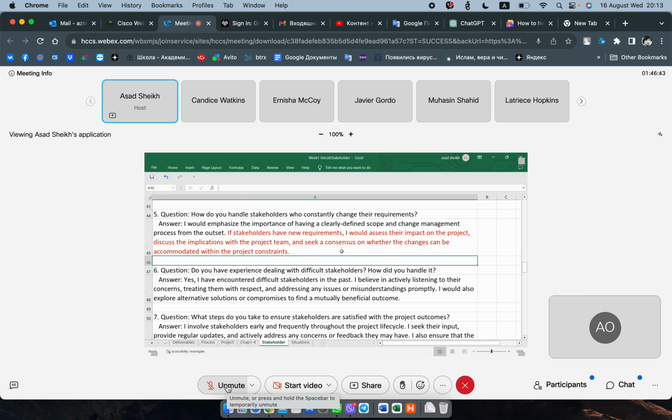Okay, you want me to make a change? Let me look at my triple constraint, which has three things on it. What are the three things? Cost, time, which is schedule, and then budget, the dollar sign. So that's the impact. Is there any impact to cost? No. Is there an impact to timeline? Yes, because they want me to add new stuff that's going to take another 2 weeks. Do I have an extra 2 weeks in my schedule? Those are things you have to determine by doing this impact analysis.